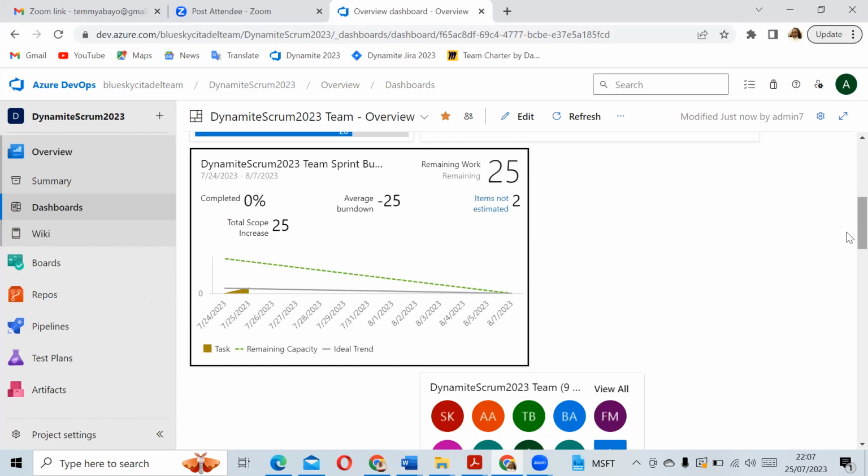Okay. Go ahead. While the BAs were working in UAT, they noticed a defect. Should they move the story back to in QA, or do they need to wait for the QA to move it, or do they just write a comment to the QA? Because that is something the QA should have picked up. So they move the story back to in QA, and in the discussion column of that story, they put the reason why they're doing that. It's something they can also notify them about during the DSU, even after they've done that.